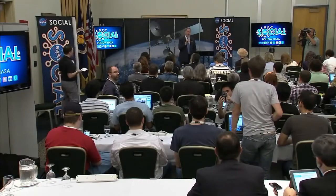Yeah, that's a good question. The Landsat LDCM mission is scheduled to launch out of Vandenberg February 11th. So what we would do in our program, if TDRS-K did get delayed, let's say by a day, is the team is already on standby, ready to do post-flight analysis of the flight, even if we have a 24-hour delay, to get that done as fast as possible to make sure we don't have any impact on the launch out in Vandenberg.